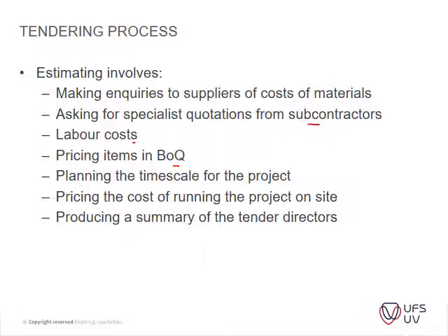Planning the timescale for the project is mainly for the P's and G's, to be able to price them. For instance, if you've got a crane on site, how long will that crane be on site? Cranes are usually charged per day, with the establishment cost and then the cost per day calculated on top of that.